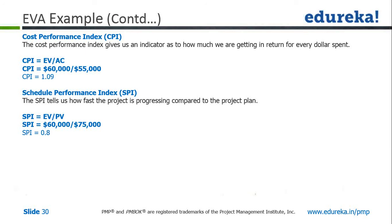In a typical situation, you should get 1 for both CPI and SPI. In a very hypothetical situation — and I use the word hypothetical because in the real world we always get some variances, delays, and challenges — a CPI greater than 1 and SPI greater than 1 is good news. But the important point: staying behind schedule is not good news, but staying ahead of schedule may also not always be good news, because you may have dependencies with another project or program.